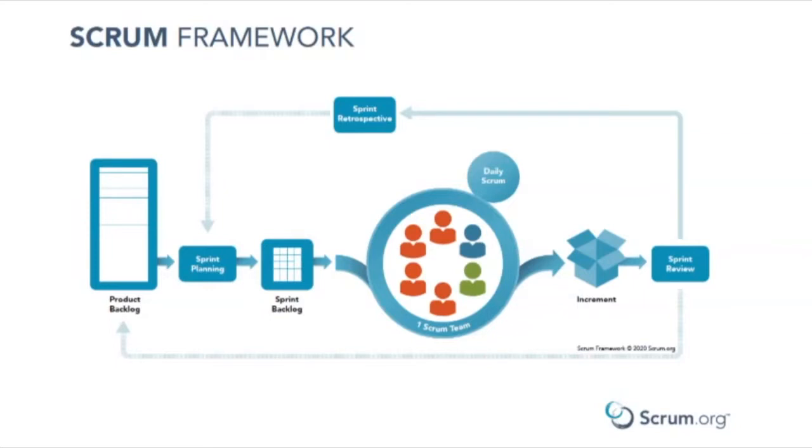Product backlog refinement is the act of breaking down and further refining product backlog items into smaller and more precise items. This is an ongoing activity to add details such as description, order, and size. Attributes often vary with the domain of work. Sprint backlog. The sprint backlog is composed of the sprint goal (why), the set of product backlog items selected for the sprint (what), as well as an actionable plan for delivering the increment (how). Means in short, why, what, and how.